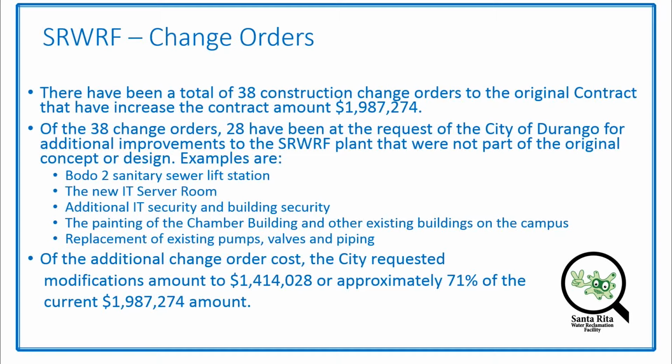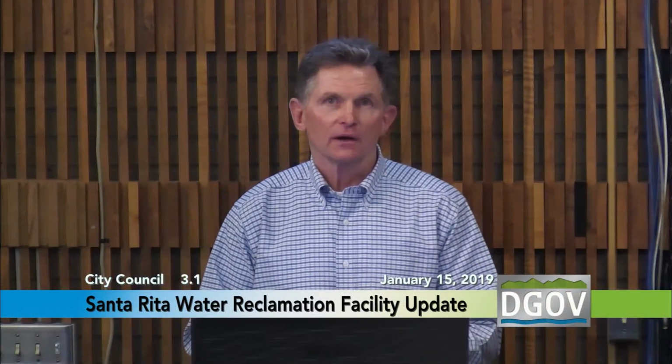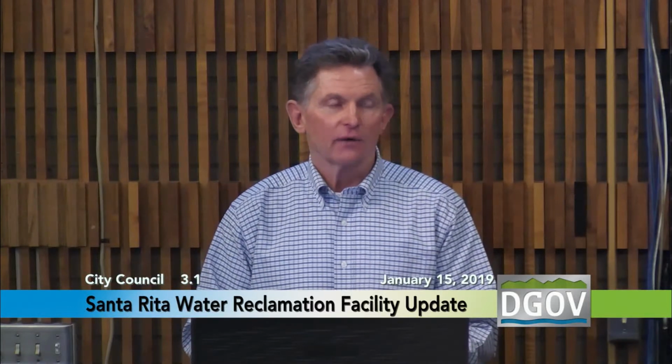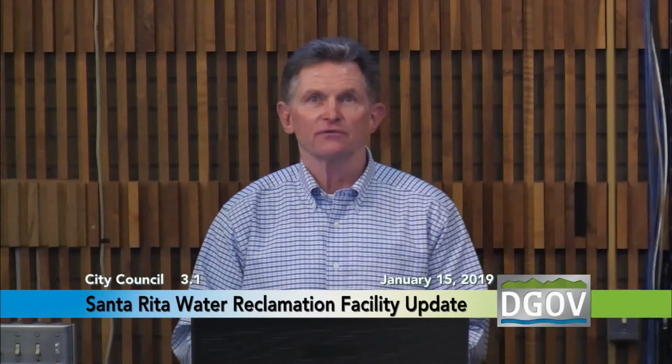We decided early on in the project that if we could rebuild that aging infrastructure, the initial construction cost would pay for itself over the 20-year maintenance on that old lift station. So we went ahead and included that in the project. That alone is over $500,000 of our contingencies so far. So that was a very big hit to the money that we had in reserve.